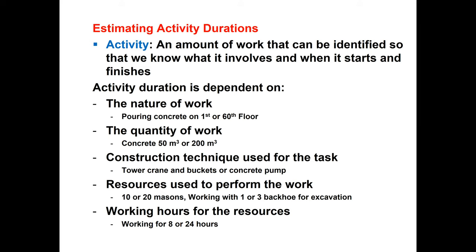Duration will also be dependent on the resources used to perform the work. Resources mean, for example, the labor force: are 20 masons working, or only 10 masons, or 5 masons? So how many resources we have employed, duration will depend on that. Or take another resource like equipment. Are we working with one backhoe excavator, or with three excavators? So if we increase the resources, we can reduce the time.